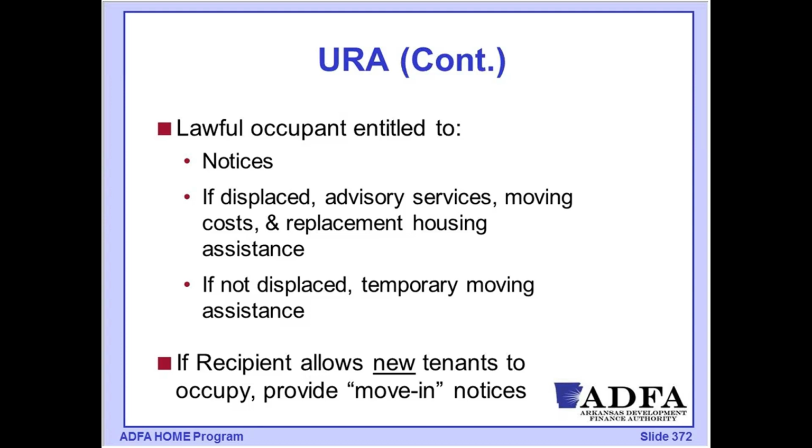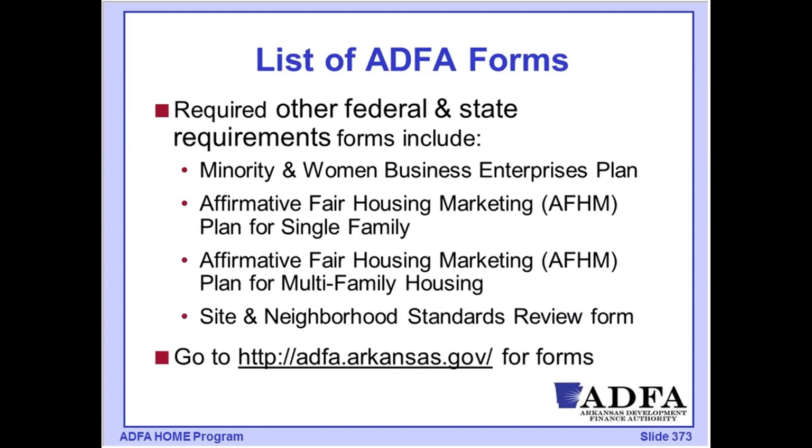If we have a project that is going to allow new tenants to move in, we would want to make sure that they are provided what we call a move-in notice, which simply tells them that there's the potential of a project occurring on this site, and because you've been notified about that before you move in, you're not going to be eligible for Uniform Relocation Act funding and assistance.